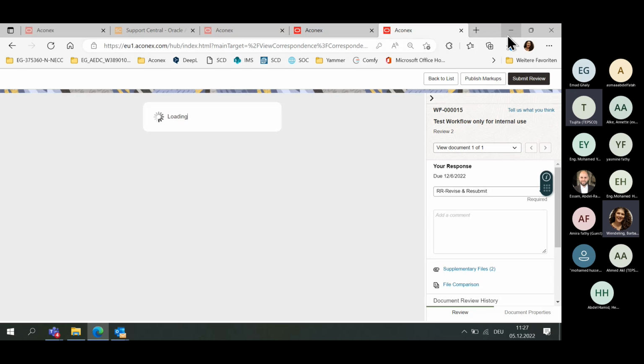But this requirement management system, Polarion, can only bring comments back in an Excel sheet. So if the customer makes the comments in the Excel sheet, it's one advantage that we also refer to the chapter from the contract, for example. The customer or engineer can see that chapter 1, 2, 3 from the contract is mentioned here, and this is a requirement.